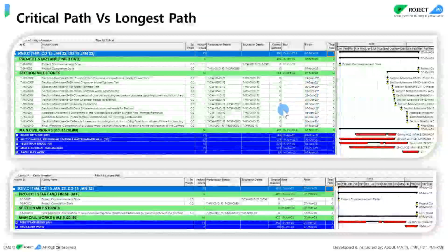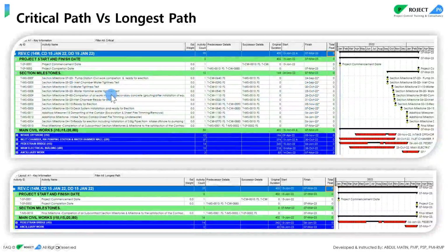The critical path is not showing with this constraint date that is set for the contractual milestone. The true critical path is only the I-15. If any of the tasks from the critical path are delayed, it will impact the project completion. But it will not be the case for other areas. A one day delay to other areas will not impact the overall project completion. Okay.